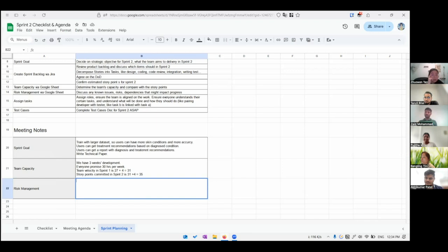I think maybe I don't have 30 hours to work per week, so maybe this is a risk because I have some other work to do. Okay, so maybe we can put everyone promises 25 hours per week.